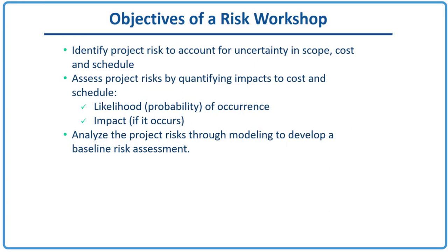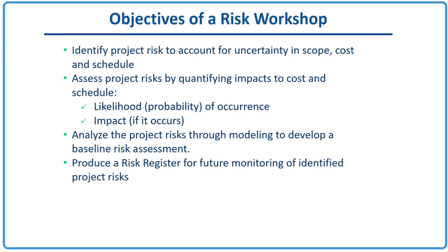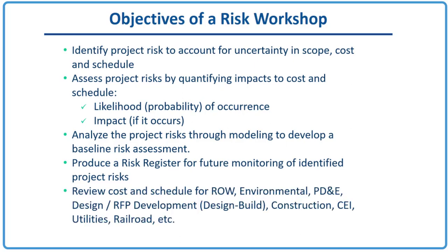Analyze the project risk through modeling to develop a baseline risk assessment. Produce a risk register for future monitoring of identified risk. And then review cost and schedule for all of these different areas that you see here: right-of-way, environmental, PD&E, just to name a few of them.